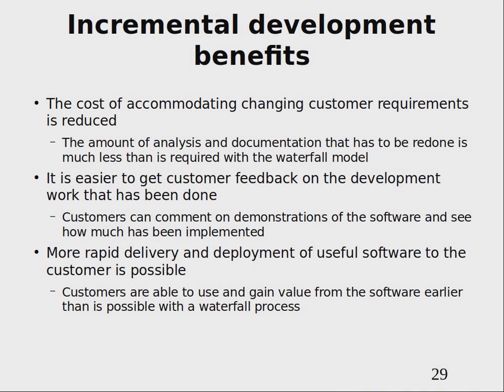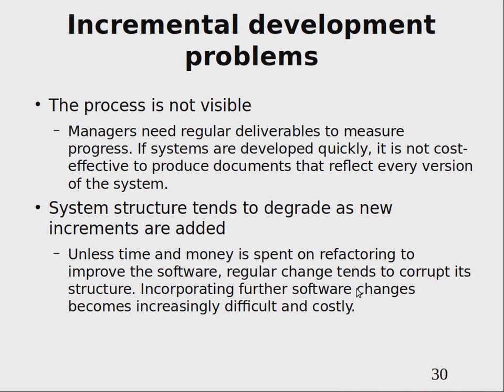But if you need to develop a very precise application where any error may be very critical, then these iterative approaches may not be the best way to deal with it. Another problem with iterative approaches is that measuring progress may be very hard, because you may have something working in the very early stages of the project, and then you can spend a very big amount of time working on it, and still not have anything much different.